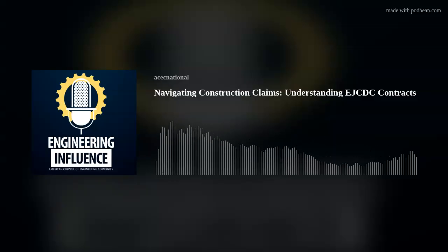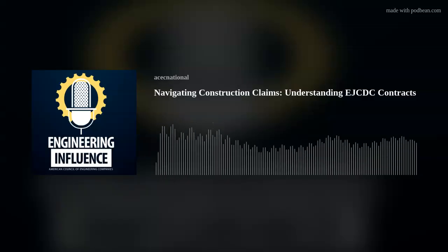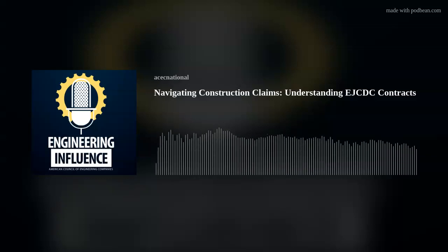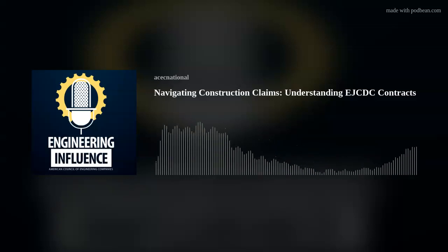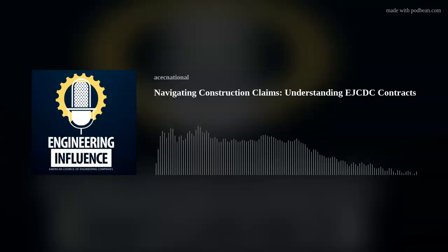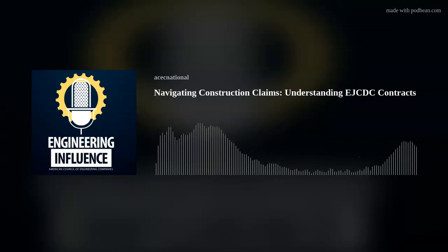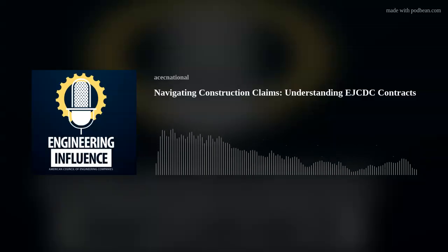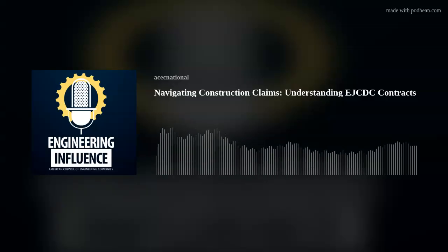Here we're generally above the ground. We might be doing renovation or rehabilitation in an existing building or structure, and we found something in there we didn't expect. For example, I thought that if I knocked down this wall to connect these two rooms, and I didn't know that there's a pipe chase in the way, or didn't know that there were electrical conduits buried in that wall, or, gee, the foundation is a few feet different in dimensions than the old record drawings show it. So that's what's meant by differing physical conditions.